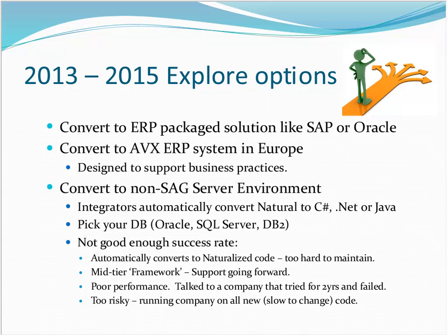And the big problem was performance. For example, one company we talked to had spent 2 years trying to get their system converted to run on Oracle, and they just couldn't get it to work, because you're taking a language written for an operating system and a database and trying to shoehorn it into another type of database, and it just doesn't work. So we decided this was too risky.